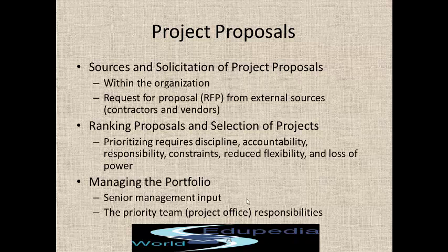You ask for an RFP, so they will first ask you for an RFI, request for information. They will collect all the information about the project. Then they will respond with an RFP. The RFP will have an executive summary. It will talk about the project objectives, what they are going to do, the scope of the project, who will be involved, the timelines, and the cost, all in a 2-page executive summary.